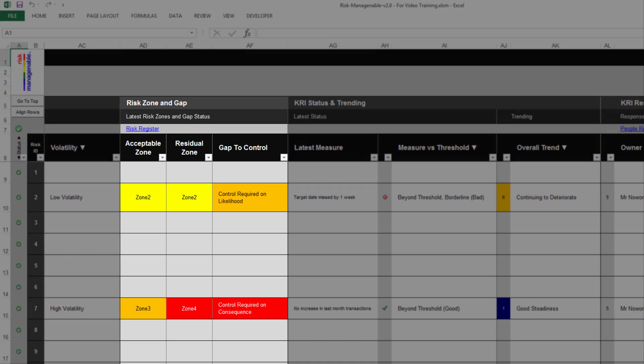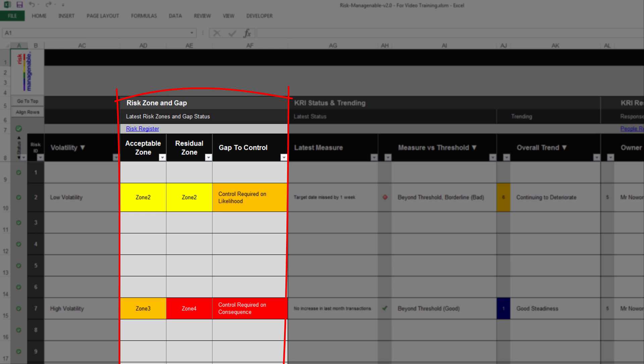The section Risk Zone and Gap is automatically extracted from the Risk Register tab, giving you the latest risk zones and gap status for the risk IDs. The gap to control is automatically calculated in the Risk Register tab and represents what needs to be addressed to reach the acceptable level of risk — it is the difference between the current or residual risk level and the acceptable risk level.